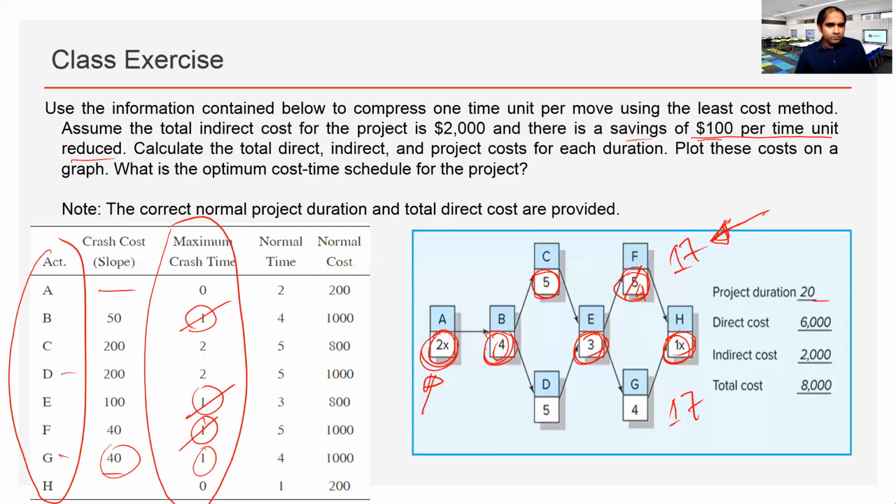Yeah, so this is where we now reach the optimum point. From that point, the total cost will again be increasing. Once we reach the optimum point, if we reduce it further, total cost will again be increasing. So that's why we need to find the lowest possible point, the optimum point. We can go, but the total cost will be higher.